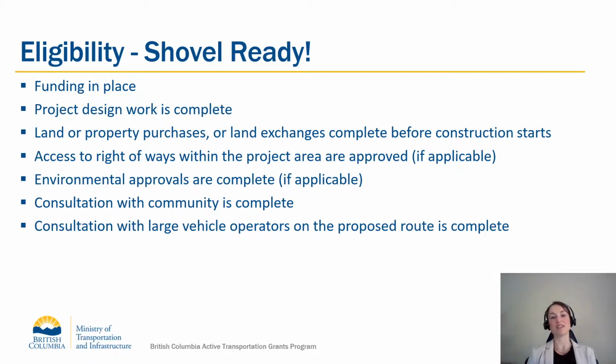All projects must be shovel-ready before they can be considered for grant funding. That means that they must have all funding secured, including other grant funding. The project design work must be complete and included in the application. All land purchases or exchanges must be complete before construction starts. Permits and access for right-of-ways must be in place and approved, if this applies. Any applicable environmental approvals are complete, as is any community consultation.